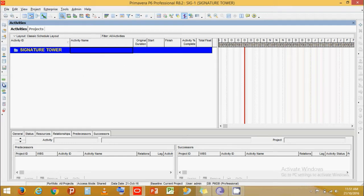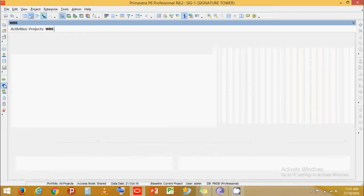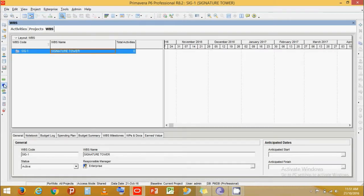So we need to start by adding WBS and then adding activities. We will go to the WBS band. People usually get confused with WBS of project and WBS of an activity. WBS of a project is breaking down the project into elements like sub structure, super structure, and finishes. Whereas WBS of an activity is breaking it down into sub tasks.